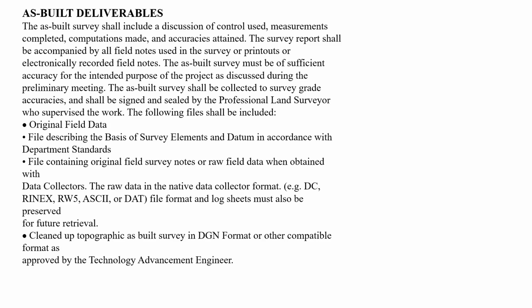The following files shall be included: original field data, a file describing the basis of survey elements and datum in accordance with department standards, and a file containing original field survey notes or raw field data when obtained with data collectors. The raw data is in a native data collector format.